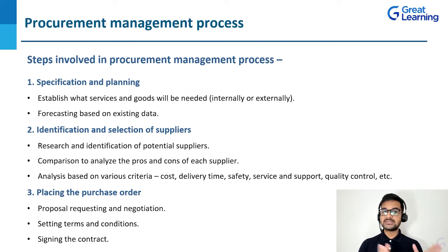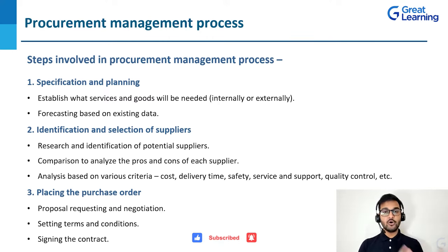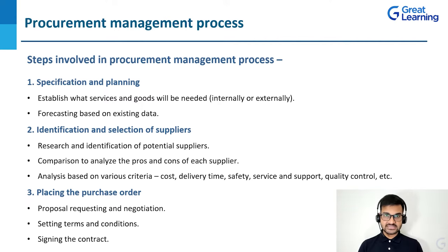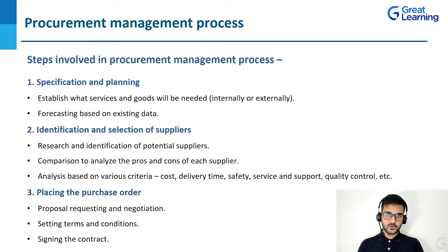The very first step is specification and planning — establishing what services and goods you will be requiring, whether you can get them internally or externally. You identify if you need a third-party vendor. Then you determine the specifications of that product. For example, in the construction industry, you might determine that for a particular project you require a certain number of bricks of a specific grade. You also forecast based on existing data — if you have done a similar project before, you can forecast the requirements and plan accordingly.